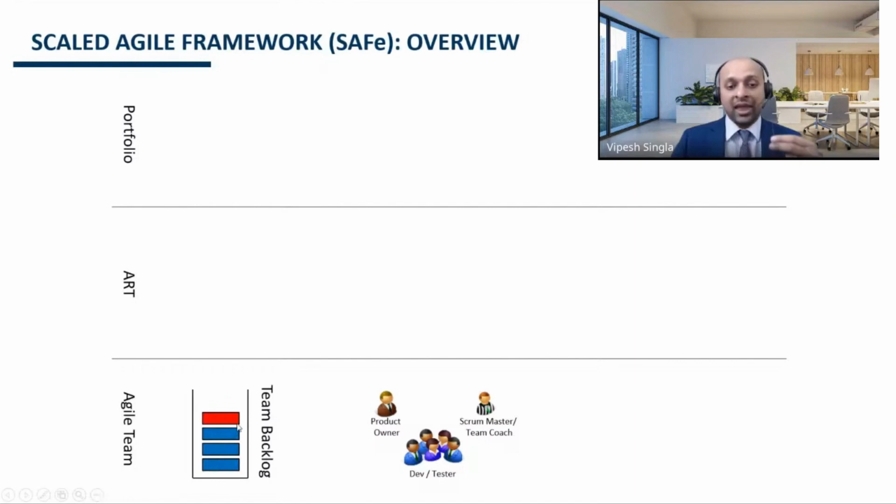Having that base in place and giving access to the team works as an enabler or foundation for delivering the business requirement. These kinds of user stories which deliver the foundation technical blocks for business user stories are considered enabler stories, and they're represented by red stories. Stories are nothing but a small unit of business requirements or customer needs which are provided by the customer.